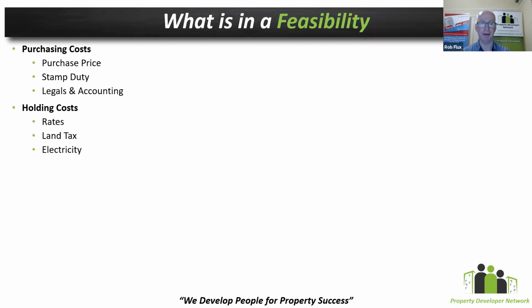So if you happen to have finished the project inside a financial year, start it and finish it in 1 year, then you won't get hit by land tax. But if you are unlucky and you've signed up just before the financial year started, then as soon as you tick over, you get 1 land tax. And if your project goes for more than 12 months, you get another land tax. You need to make sure that you're very aware of that with regards to the duration of your project.